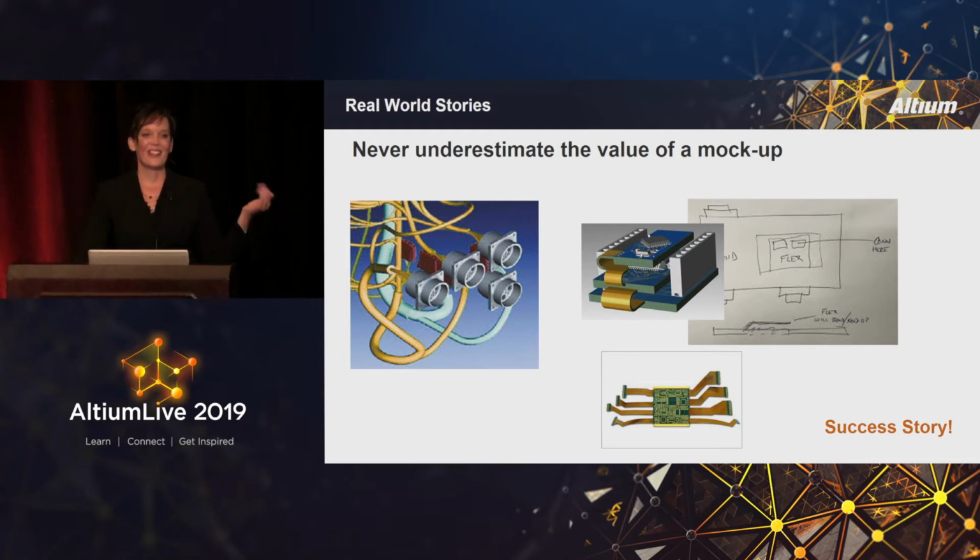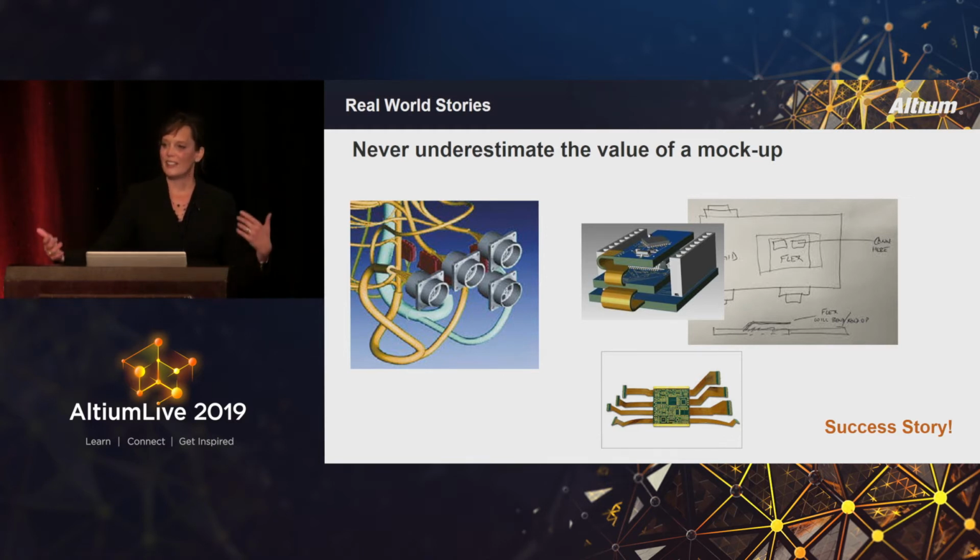Never underestimate the value of a mock-up. I know all the tools have 3D modeling that you can look at and double check, and that's great. But sometimes you've got to go the old-fashioned route and use either a paper doll or a Mylar. In this particular example, it was a series of 5 or 6 chassis stacked on top of each other, with very little head space. They weren't going to be able to go in and troubleshoot after assembly.